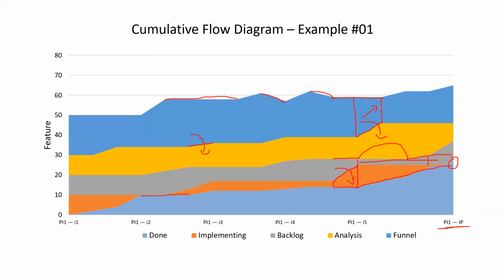Got it? Okay, so at the end, that 60 will remain as it is in the funnel. Overall issues will be the same. The number of issues in each stage will get reduced. Here it might be 20, here it might be 15, because 5 issues might have moved from funnel to analysis stage. Overall issues is 60. Correct. Okay. Got it? Yeah, got it, Satish. Nice. How about others? Are we good? Yes, Satish.